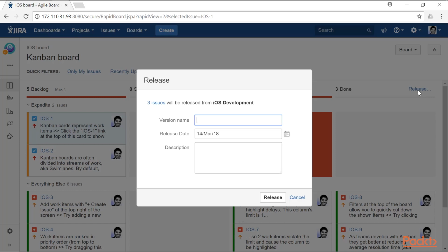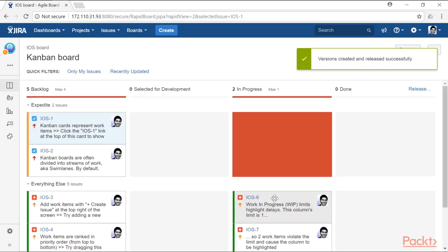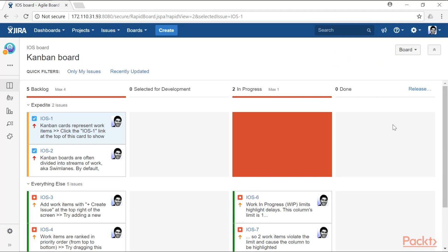But let us say you want to use a week number, let us say week 11, and you want to let everyone know that this week I did these many activities. So as part of this particular release, which is week number 11, you are saying that you will be releasing 3 issues. And if you click on the release button, these issues will be released, and the done column is now again empty. And you can now start the work again, maybe in your week 12.